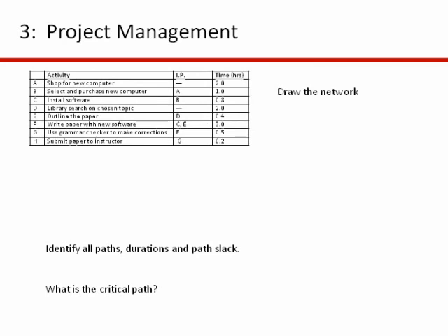Okay, so let's see if we can draw the network. All right, so this is sort of trial and error. What you would do is look for any tasks that do not have an immediate predecessor. The two tasks that do not have an immediate predecessor are task A and task D. So the first tasks I'm going to put here are A and D. Task A has no immediate predecessor, and task D has nothing before it.